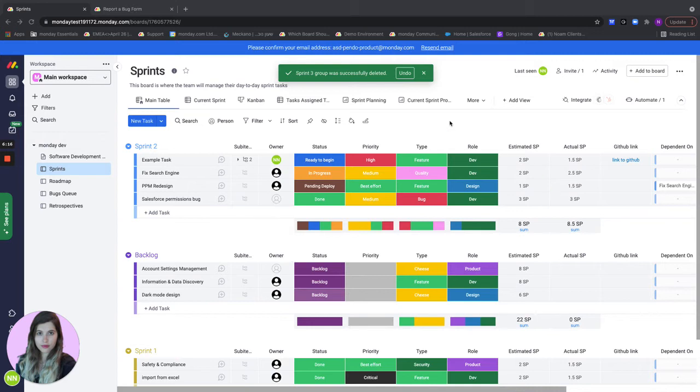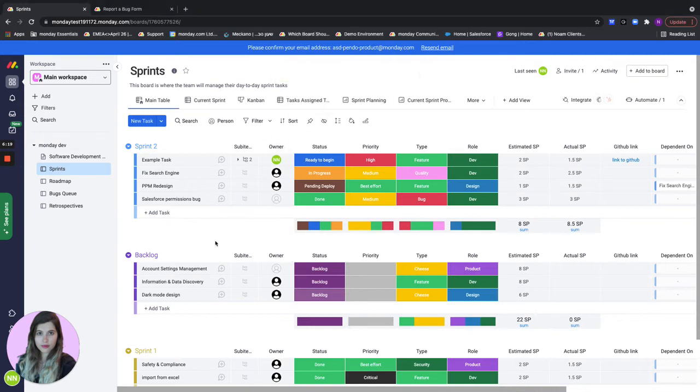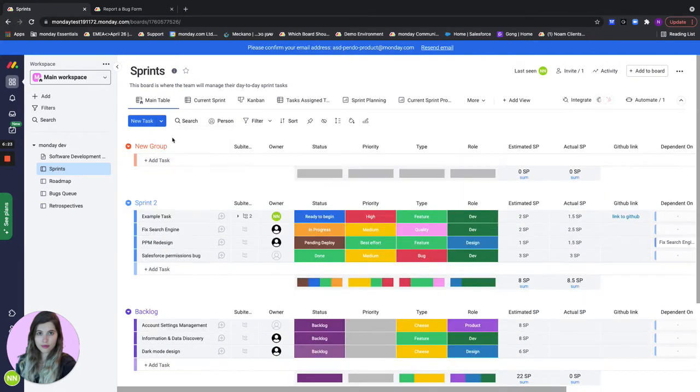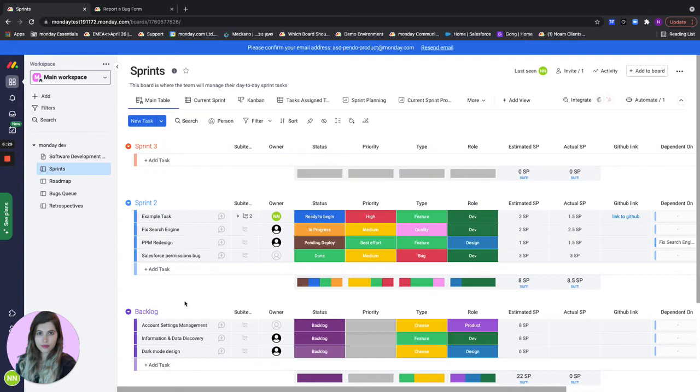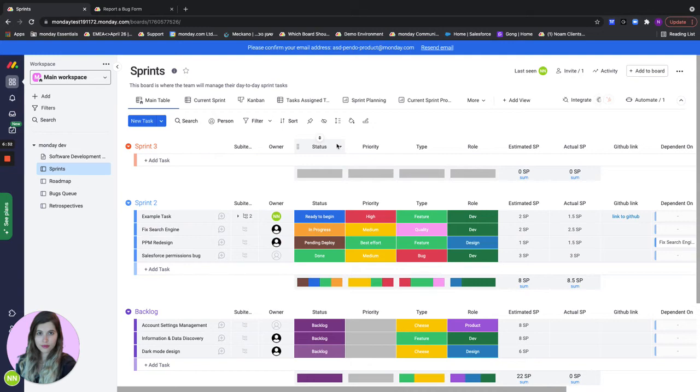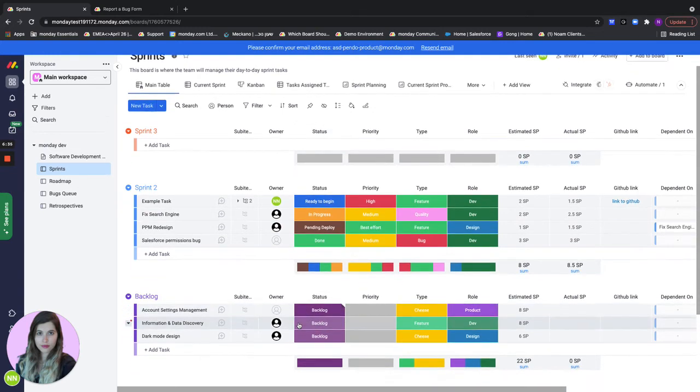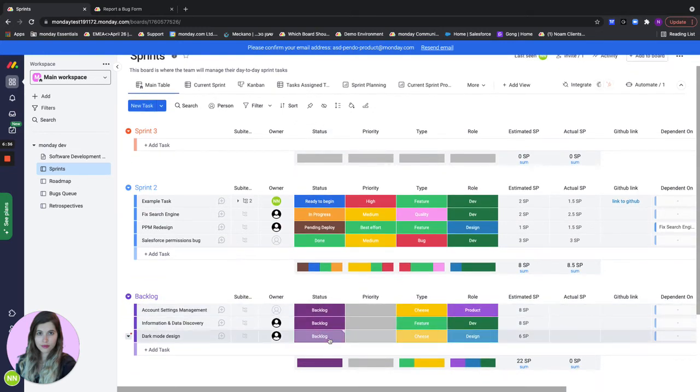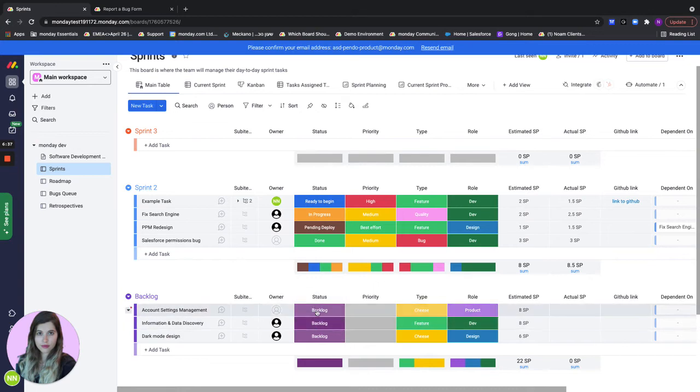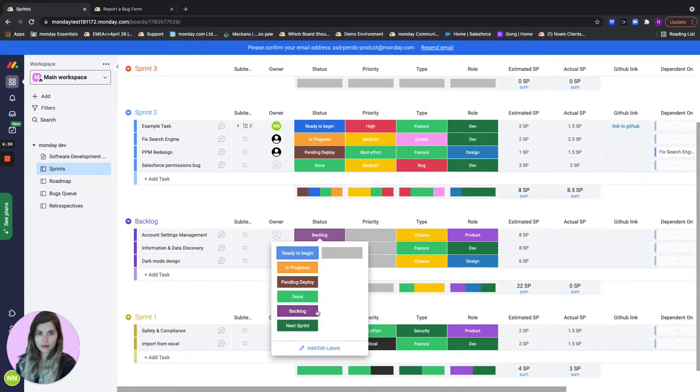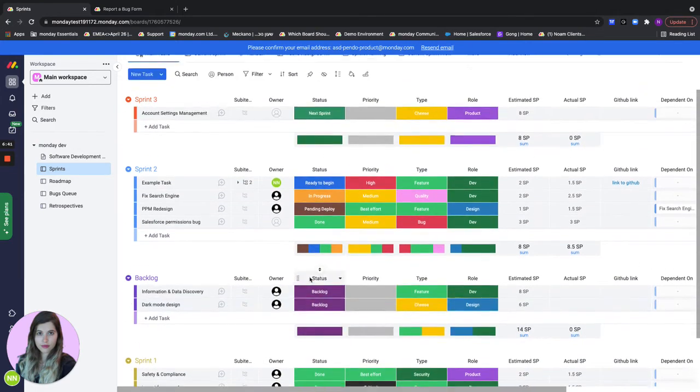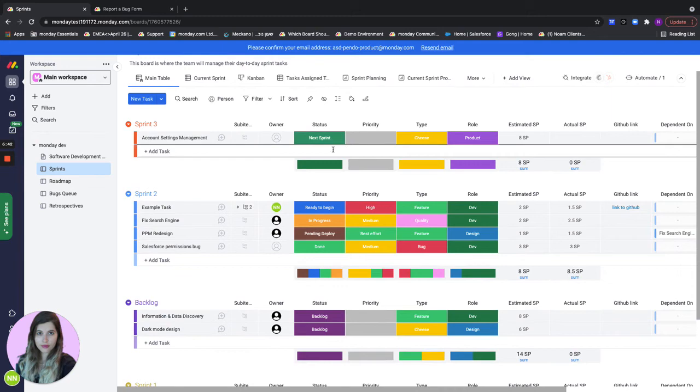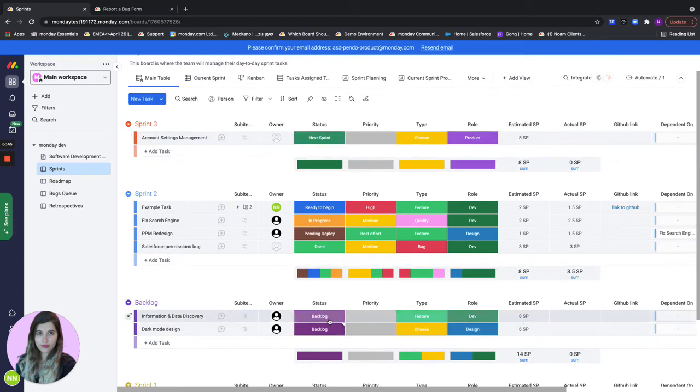The current sprint is almost done and now I'm going to plan our next upcoming sprint. I'll create a new group which would be called Sprint 3 and I will go to our backlog and start deciding on what's going to be in our next current sprint. If I go here to all of my different tasks and I change it to next sprint it would automatically move to the top group which is my new sprint group. Let me add all of the items from my backlog that I want to add to the next sprint.